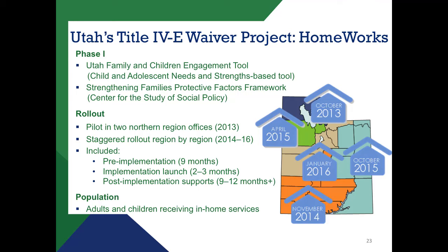but 3 that are rolling out to the regions. And we made a decision with those phases that each individual phase would roll out on a staggered basis to the regions, but then also the phases are staggered. So that created a certain amount of complexity for us, but we felt that that also made it a little more manageable for our regions to implement.